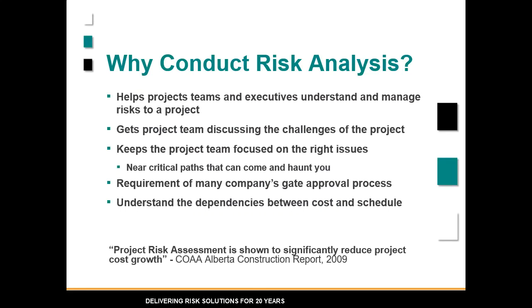So why do we conduct risk analysis? Well, there's a whole number of different reasons why we might want to conduct risk analysis on our projects. The first one is it helps the project teams and project executives understand and manage the risks on a project. It gets the project team discussing the challenges of the project and keeps the team focused on the right issues. So not only do we look at our critical path, which is what we've historically been taught to focus on, but we can also look at the near critical paths that may come back and cause us trouble as the project progresses.